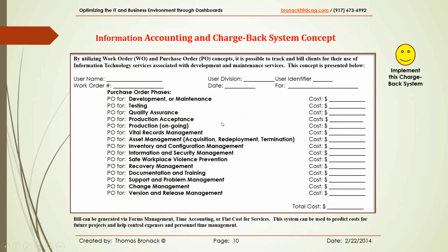Now, this is important because a lot of projects are similar in nature, and people don't really know how much the project's going to cost in advance. But by looking at a project that's similar to the one you're about to launch and getting an idea of what the total cost is and what steps are involved and how long it may take, then you can better understand how long it's going to be to actually get something done and how much it's going to cost you.